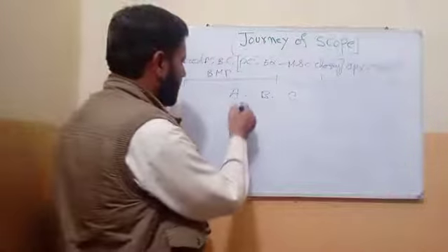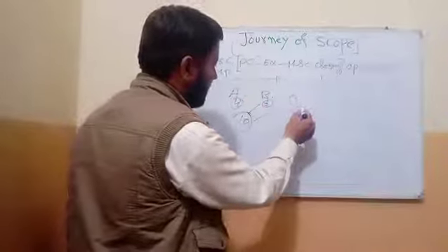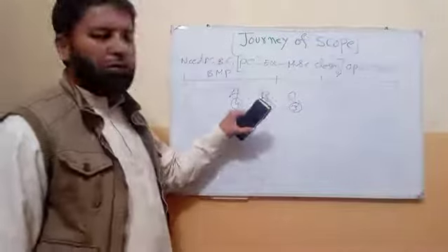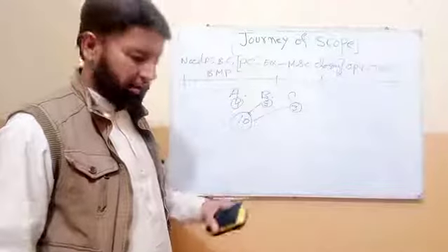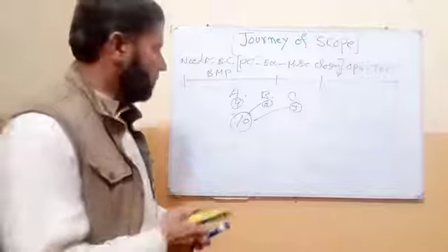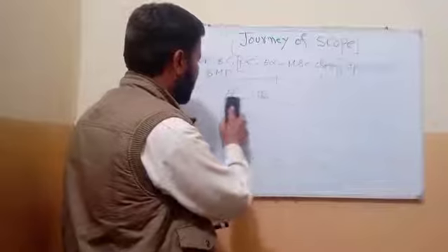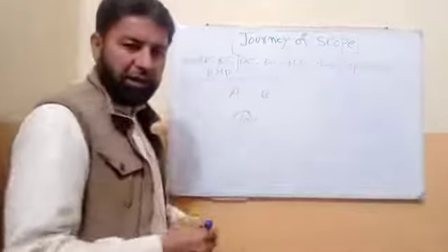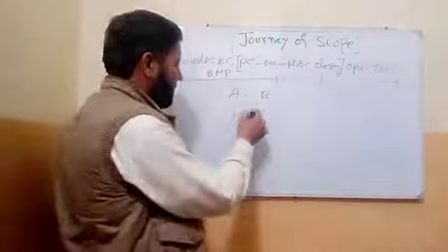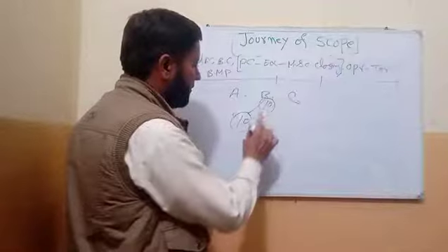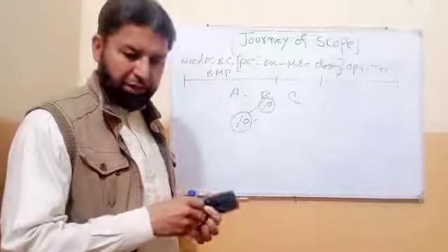And when 4 people vote on A, 3 people vote on B, 3 people vote on C, we cannot get a majority, but at least we will get more people on one side, we call polarity. When more people vote on one side, we call polarity. And the fourth one is very interesting, that is called autocratic. There is one boss and the boss will take the decision for the complete group. 10 people vote here, the boss will take the decision for the group and we will call it autocratic or dictatorship.